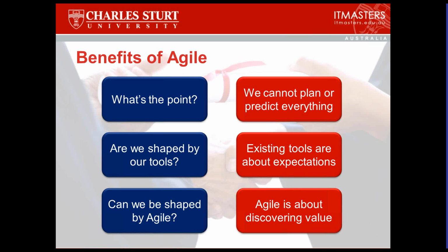I wouldn't necessarily say that that's a consistent assessment. Looking at each point separately, would Scrum necessarily give you more but take longer? Well, not necessarily. You might have a Scrum deadline that said, well, we're going to finish by this deadline, and therefore we might get less than we expected because we've made the deadline sacrosanct. We've basically said, well, we're not going past this date. We're going to do our best to deliver the most effective thing of our project by that deadline, but we're not going to move it.